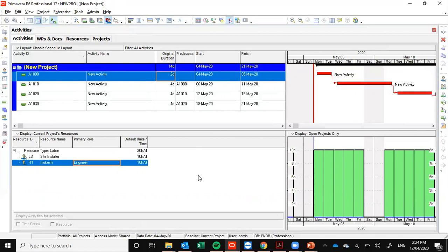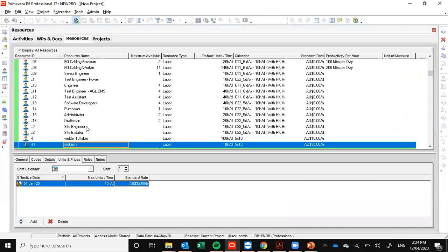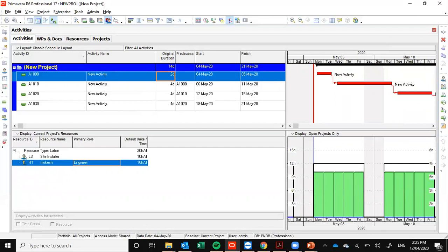And one more thing I want to add in that. See, like we have over allocated, same thing, sometimes we have under allocated. So yesterday we forgot to put it in our slide, but let me show you just for your concept. Like if Mukesh is feasible for working 12 hours per day, then it looks like that. Means it's showing you under allocated. So whenever the resource is under allocated and you have to increase the resource pickup so it can utilize properly, we call it resource smoothing.